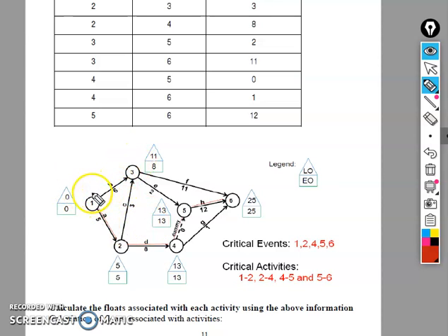Okay, so according to this concept, you start with E, the earliest occurrence of 1. It is the starting node, so it should be equal to 0. So here we mention this 0. Next we find the earliest occurrence of 2.